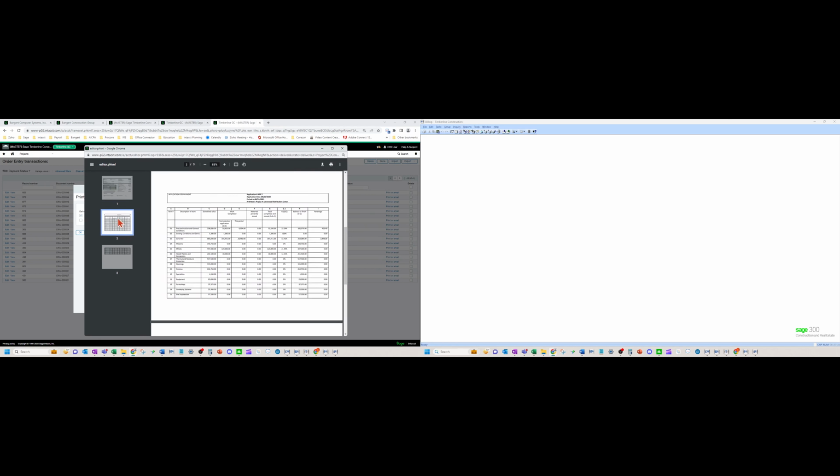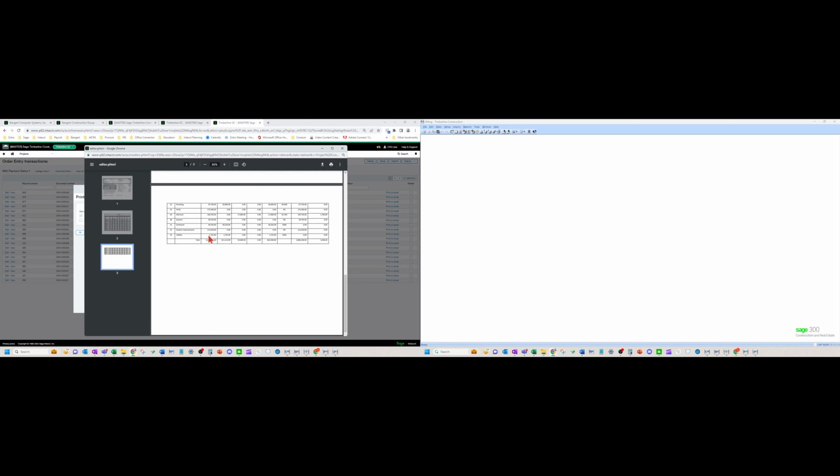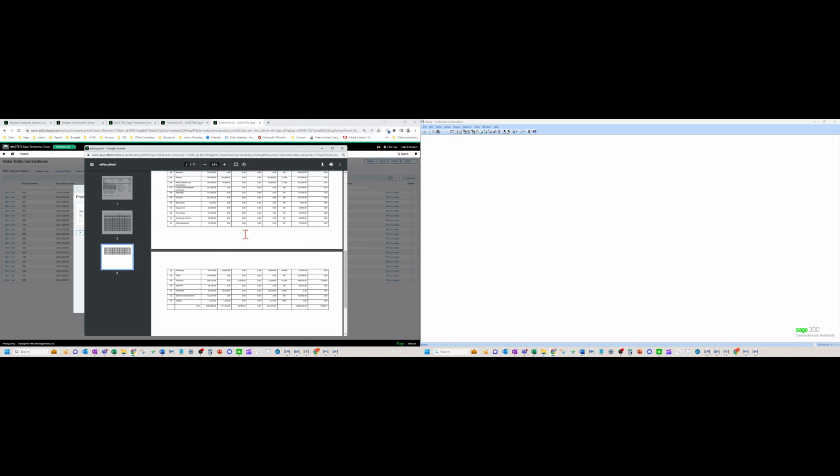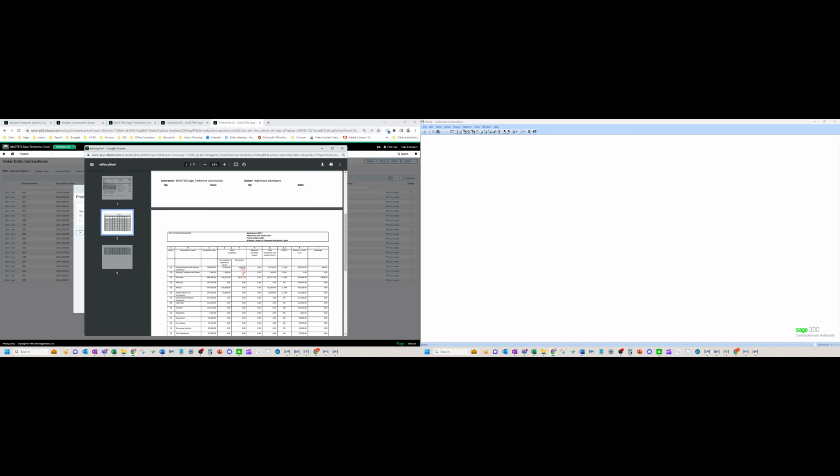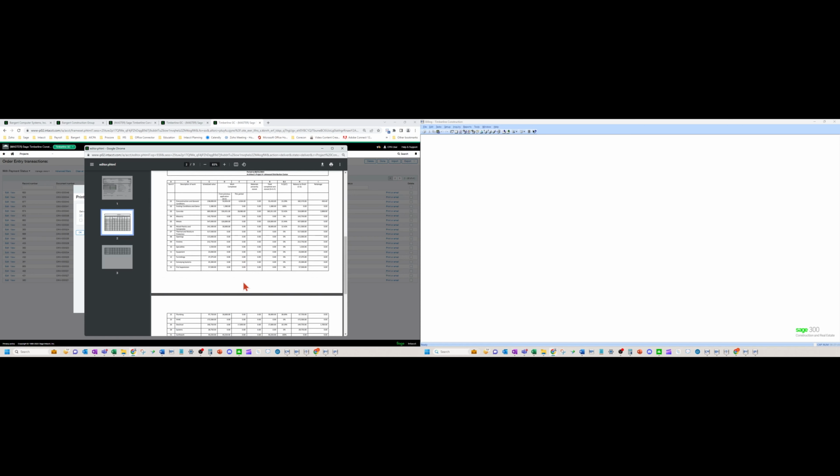Okay, so this is time and material based, but AIA with one of the lines having a GMP. Okay, so it kind of covered a bunch of scenarios there. So see my zero, I zeroed out that because it had an $1,800 bill current period. So zeroed it out. I changed that one bill to $17,000. And it put it all in the appropriate categories, obviously how I mapped my cost codes based on my lines over here in the contract setup, okay?